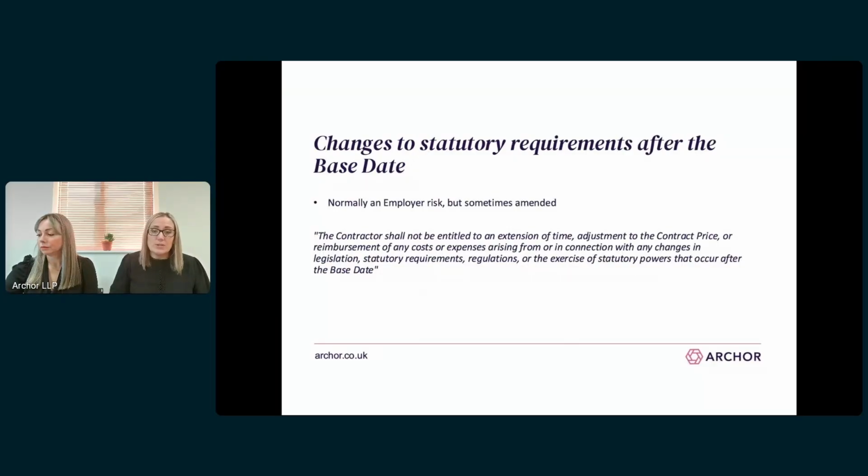So moving on to changes to statutory requirements. Under the unamended JCT suite, changes to statutory requirements after the base date are an employer risk. However, this is often amended to seek to place this risk onto the contractor. And again, I've put an example of such amendment onto this slide for your reference.